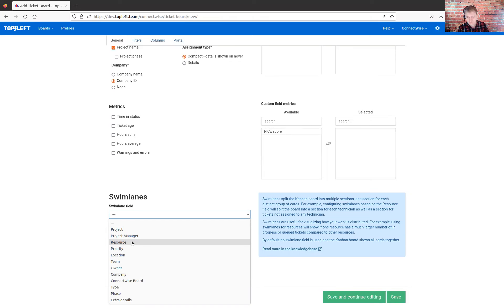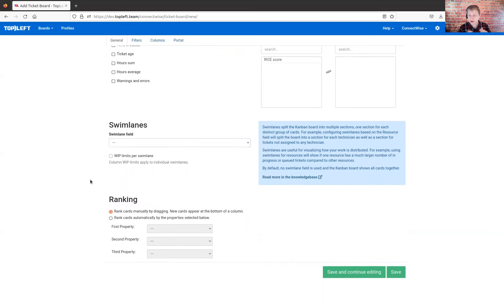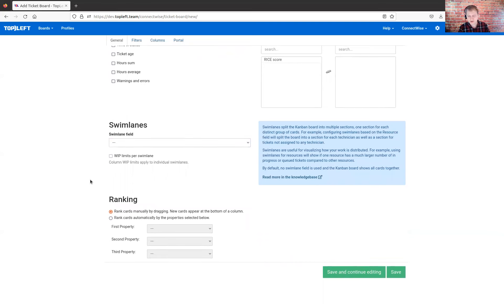There's a variety of fields that you can choose here. A common one for almost any use case is the resource swim lane, which gives you groups for the individual technicians doing the work on your board. That lets you see things like which of my engineers is really busy and which ones are not busy enough. There's a variety of different choices to determine how we're grouping the tickets on this board.